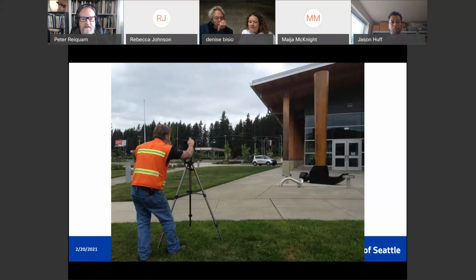And then I photograph it. And this is something I highly recommend you consider when you're doing projects, especially out in public places. You document them immediately, because the piece is never going to look as good as it does on that day. Even if the weather isn't ideal, as soon as you turn that piece loose to the public, there's a potential for something to happen to it. And it might not be anything malicious. It might be just some footprints on the plaza, or some smudges on the finish, or handprints or something like that. So I always make sure I clean it and photograph it right away. And sometimes I'll go back later and photograph it again, but I make sure I get good documentation on that very day. Next slide, please.